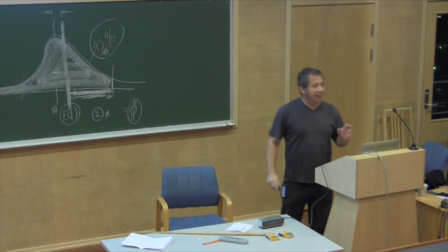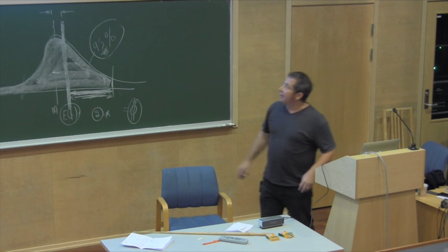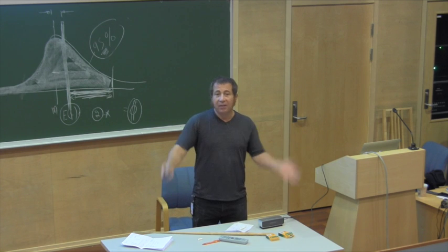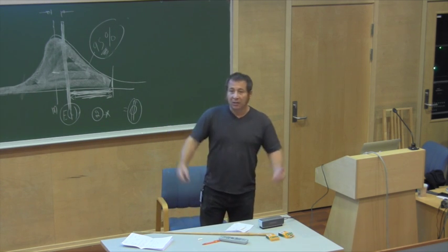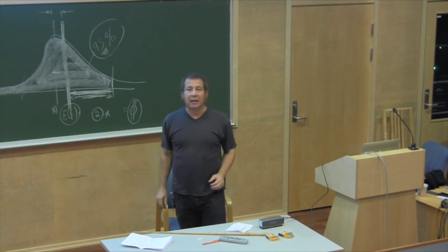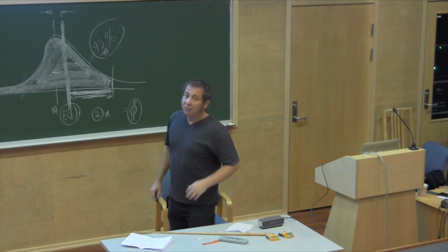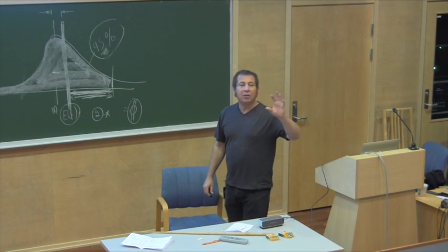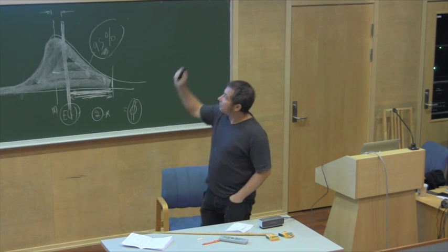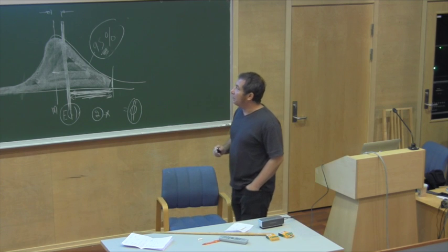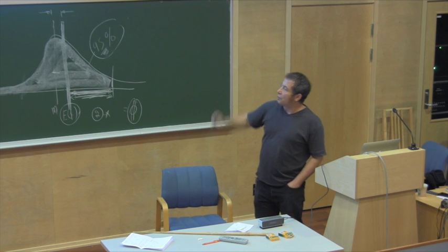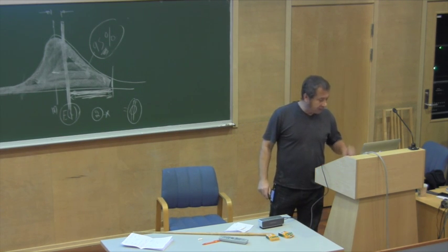Just thinking like that and doing that. And again, the risks. It's very cold, so they thought that they had to be above the ground before December, so that the equipment and the other parts could come and be installed. So an out-of-the-ground detailed plan was developed before the winter struck. Again, heavy planning. Transport was done at the right time. Risk assessment, this kind of way of thinking, saved the project around $3.5 million.